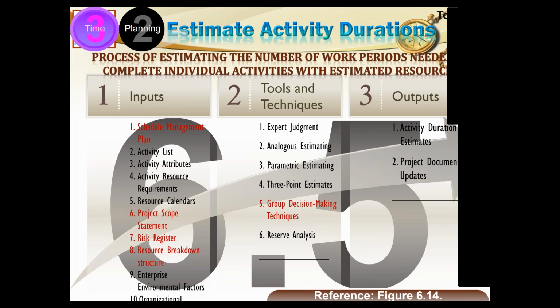So what you do is you go around surveying people and asking them questions like, if you do this job, how much time will you take? And you collect all this data. And naturally, if you collect this data from so many people, there will be a lot of diversity, and you have as many answers as the people you have surveyed. So you can make use of statistics here in determining the most suitable time which you can allocate to your activity.